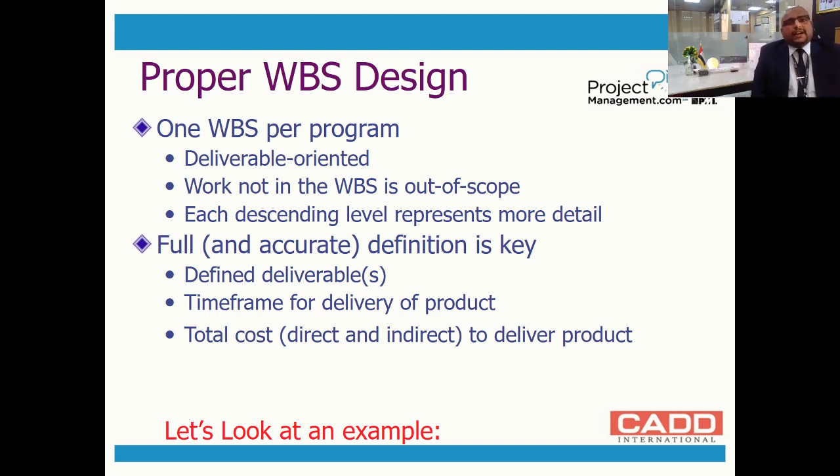Simple example. If I am going to construct a home or a villa, I will divide the project into site works, foundations, ground floor, first floor, MEP works, architecture works, landscaping works. That's it. So you can see how easily and how precisely it has been divided. Work not in the WBS is out of scope. This is how it works.